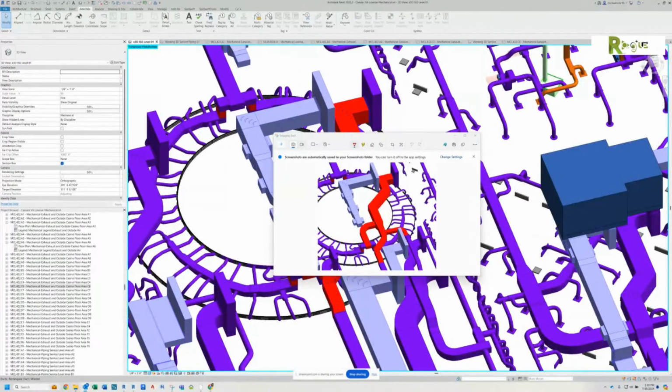It's already gone. I've already moved it. No, but I'm telling Jason, they're going to need to lift it up 8 inches. All right. And lifting up duct, Mike, is easier than dropping duct, because when you've got to drop ducts now, you've got to put all thread in because the all thread's too short. Gotcha. Okay, neither one of them is fun to do. They should have to pay for any of those changes, because the idea was we're supposed to hang this duct once. That's why we did all this bend coordination.